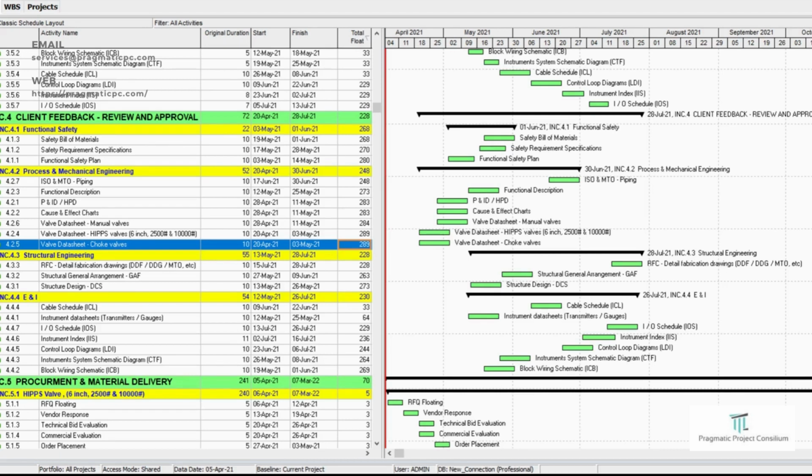When we approached the control account manager for the estimated task durations, he often estimated around 60 days. This posed a problem as nothing could exceed a maximum of 25 to 30 days.